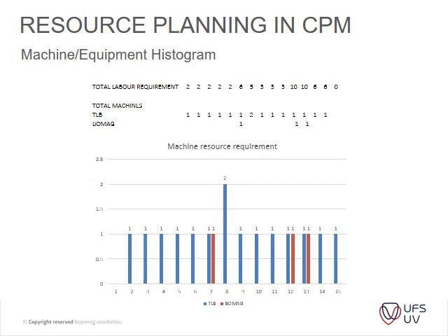On this particular day, you need two TLBs, and this is basically what the exercise shows: you don't have two TLBs to use, and you don't have money to get a new one, so you have to do a bit of resource leveling, and this is where you cut off your resources.